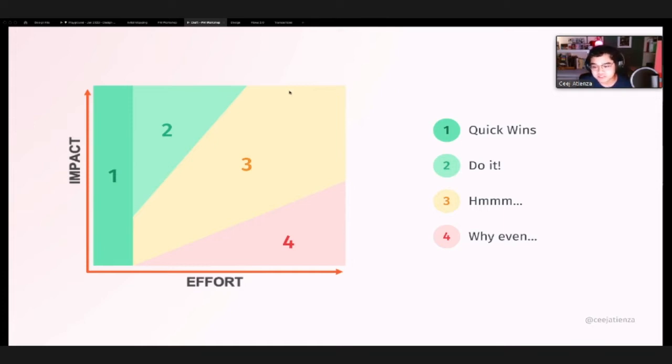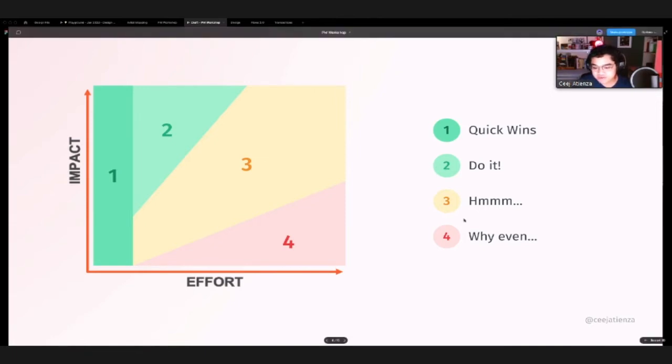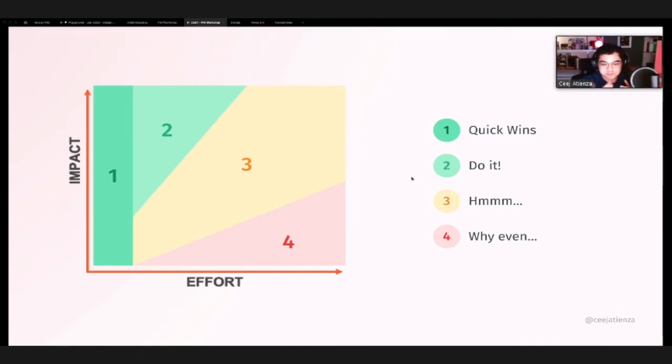Now, if you're building an agency, like me and Nikki here, you also use this for your clients. For example, they have all of these different features that they want, right? And being on the other side of it, being the freelancer or being the agency, you're going to have the tendency to say, oh my gosh, this is too much. So you want to show them how to prioritize these features. So you want to start with the low effort ones with the high impact. For example, right now we're creating designs for this fintech startup, and we're really working to make sure that the ones that we initially released to our client are the lowest effort possible so they can ship faster, since that is the overall goal that they have. Then more features like integrations with different APIs, integrations with different e-wallets, like that would work better in the section 3 area since it's high impact and high effort.